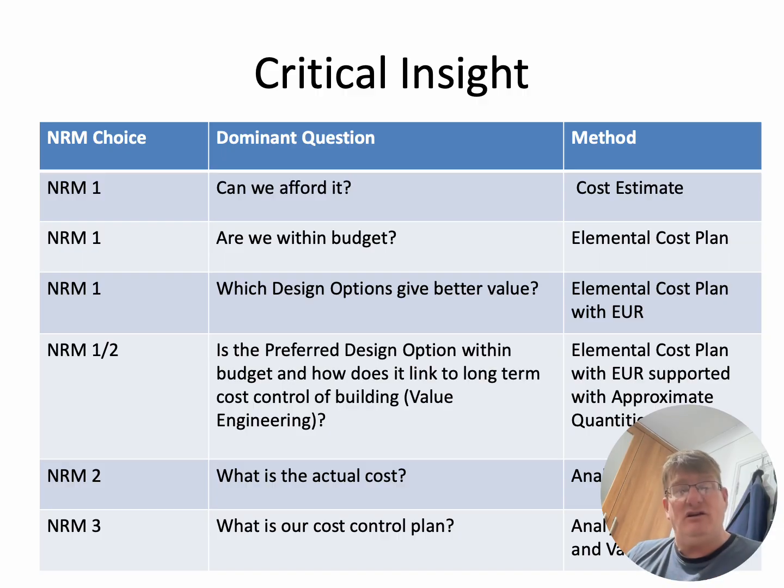Once you've decided on that, you can then produce much more accurate tender drawings, and you can then come up with an actual cost, and that's where we would produce analytical estimates. And you would probably get the contractors and the subcontractors to do that with you, because there's an argument that that's their speciality and their specializations.